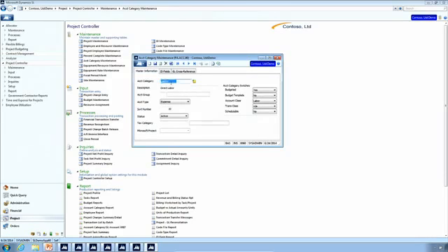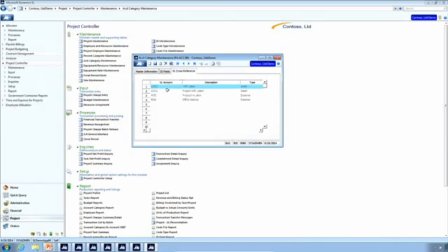Now the thing we have to caution is we would never want to associate a labor to a revenue account, because then we would have inconsistent postings between general ledger and projects. So you have to be careful there. But it's okay to put an asset with an expense, liability with a revenue if you wanted to.